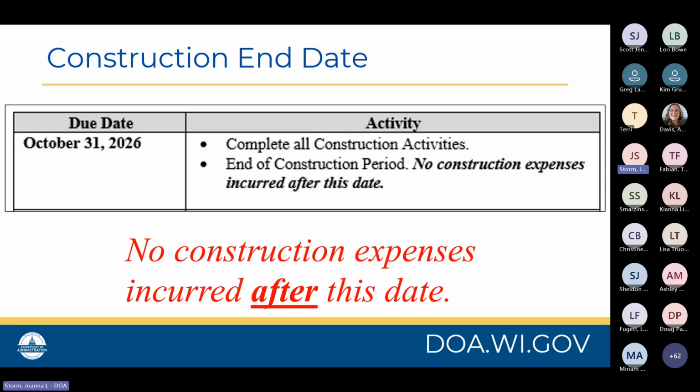Since we know in the state of Wisconsin, we never really know when winter is going to show up. It might show up early, it might show up late, it may not show up at all. And the spring thaw could be potentially very finicky. Sometimes the thaw is very late, and it may end up delaying construction start for that particular season.